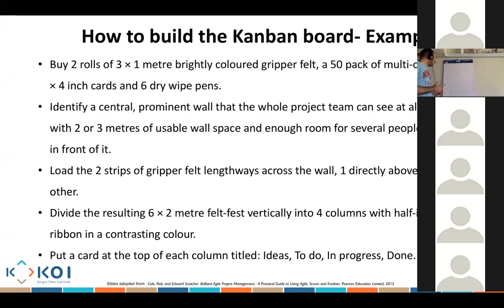And from there, when we have all of this backlog, all of these to dos will go into sticky notes here, all of these user stories. And once I'm working on something, I pick up some of these user stories and put them into the to do or in progress, or whatever it is, and I'll start moving them. If, for example, I pick up some from the backlog and put them into sprint 1, they are moved from ideas to the to do. And then once I start working on it, it moves from to do to in progress and then to the complete stage.